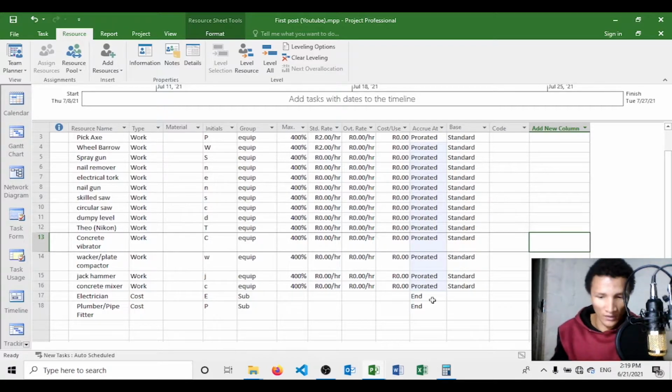So you have a section that you want to do, your subcontractor should finish it. So let's say your subcontractor finishes it after 3 months. Now you basically invoice the client every end of the month. So first month, second month, you put away the money for your subcontractors. The third month, you take the third month's payment, you put it with the other 2 months that you saved somewhere, and then you pay your subcontractor off at the end of the 3 months. So that's how you might pay your subcontractors, and that's how you might arrange with your client.